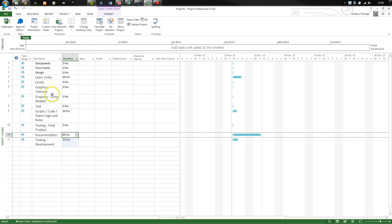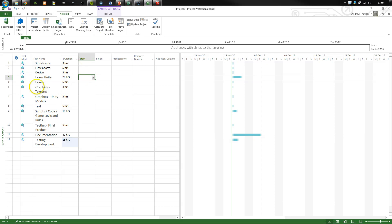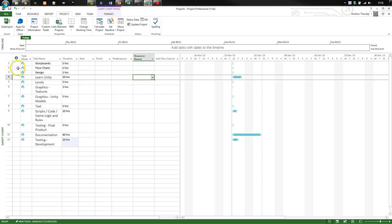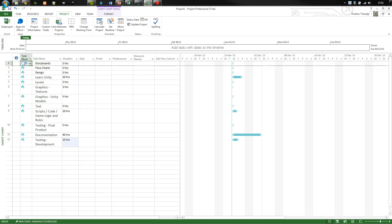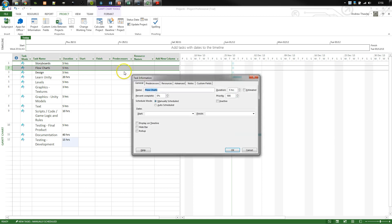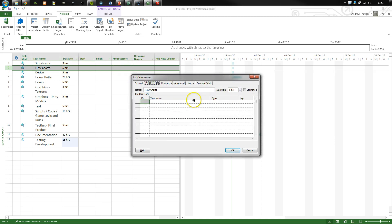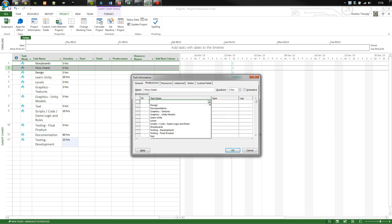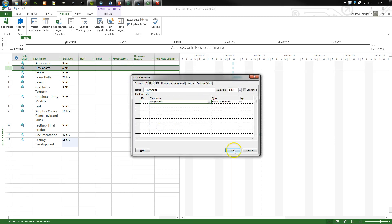So we've got our basic times. Now what we'll notice is all the little tasks have been allocated to bits of time. But you can also see they've got little question marks. Because at the moment, none of these tasks have actually been given any definitive times. The first thing I'm going to do is set in some predecessors. So I'm saying that I need to get my storyboards done before I do the flowcharts. So I can double click on this, go to predecessors, and from task name, I can choose my option.